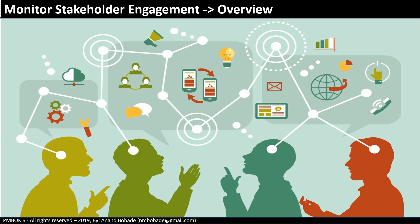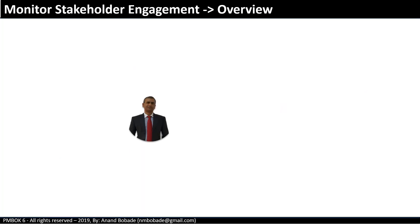Monitor Stakeholder Engagement is very critical because stakeholder engagement may change from time to time. For example, at the beginning certain stakeholders may be very enthusiastic and contributing immensely to the project, but this may change. In a software project, after an application walkthrough, a stakeholder may become disengaged because they believe once the system is live, they may lose their job. Monitoring helps the project manager identify such situations proactively and rectify them.